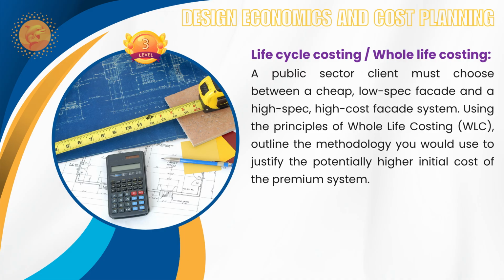You have to apply the initial capital cost modeling, and then your future cost for both systems. The higher specification system will have lower maintenance and repair cycles and better thermal performance that will reduce the energy consumption. You will have energy efficiency. So based on that, you will apply NPV. And similarly, you will apply the same thing for the lower specification one.